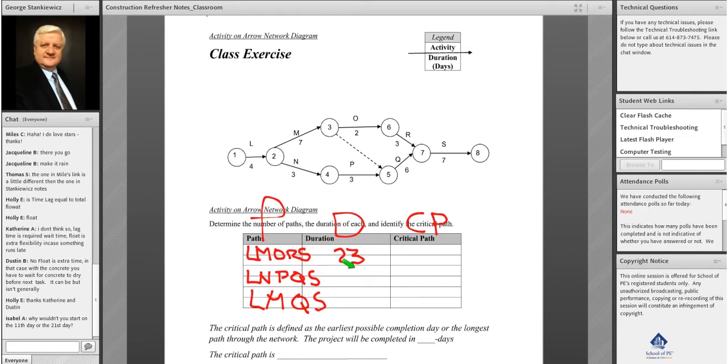Four plus three plus three plus six plus seven is 23 days, and then we have four plus seven plus six plus seven is 24 days. So we've completed our path duration.